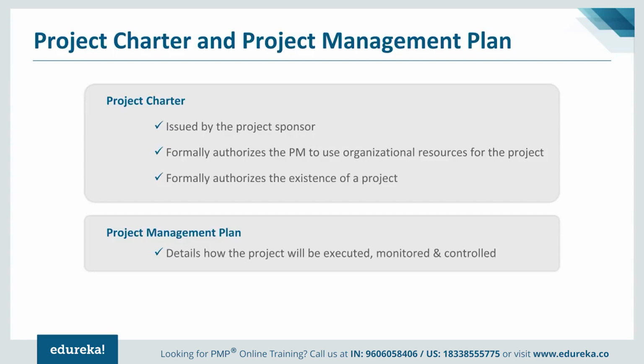Apart from that, you would also have in the project charter things like the start date and the end date for each of the key milestones that I've agreed with the stakeholders. Then, who are my signing authorities? Who is going to give me sign-off on some of the key milestones when I achieve them? Then a bit on cost, whatever is mentioned as part of the business case.